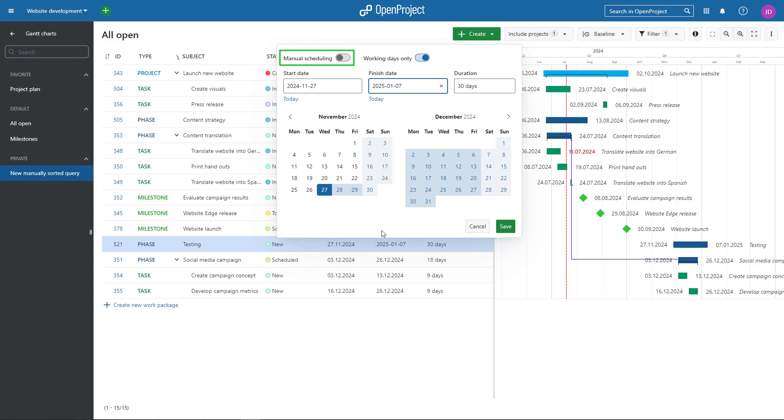Manual Scheduling allows you to set dates for the parent work package manually, independent from the duration of existing work package children. It is referred to as top-down scheduling.